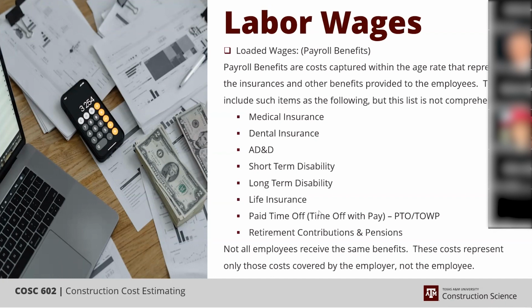That's open shop. You move to a union environment, they've gone up lately, because in years past, all the union work I was dealing with was like 56 to 72%. Now it looks like it's 72 to 105%. So the unions have been busted for mismanagement of their pension plans, and they now are billing extra money to refill the pension coffers that they owe the craft.